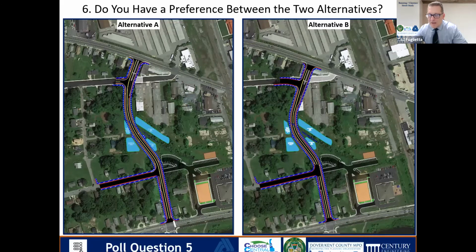And if we can't eliminate those impacts, we have to show how we're going to mitigate or lessen those impacts and what we're going to do about it. So from a flooding standpoint, we'd have to identify which areas are prone to flooding, which homes might be prone to flooding, and what we're going to do to address that in NEPA. We'd have to get the required permits. We'd have to work with the appropriate agencies, and it wouldn't just be something we're doing on our own. We'd have to work with DNREC and the Army Corps of Engineers and the EPA and all of the regulatory agencies that would have say on any project that has federal funding and/or has impacts to a federally protected resource.